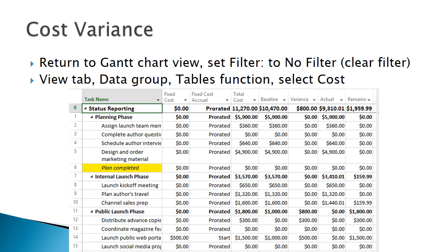It's important to note that this is an important view because here we can see all costs: the entertainment cost resource, fixed fee server cost, and bound galley proofs material costs are all visible in this view along with the costs of human resources. Some other views might not include them.